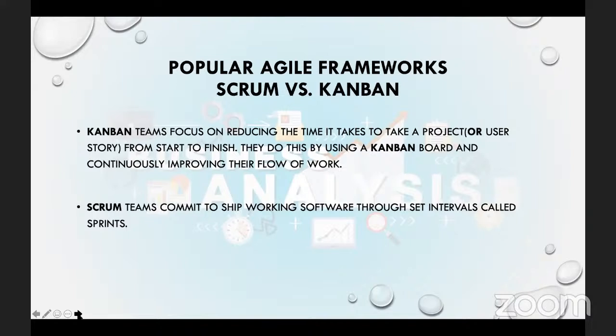The difference between these two frameworks of Agile is that in Kanban, when we pick up feature sets that we want to build, we just take the features, we develop them, QA test them, we ship them, we deploy them. We don't have any time iteration. We don't have anything like sprints or a two-week, four-week, or one-week cycle to get our work done.